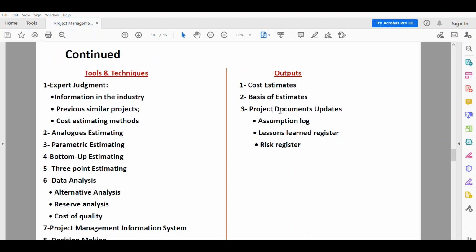Cost estimates can be presented in summary form or in detail, and costs are estimated for all resources that apply to the cost estimate. This includes, but is not limited to, direct labor, materials, equipment, services, facilities, information technology, and special categories such as cost of financing, including interest charges, inflation allowance, exchange rates, or a cost contingency reserve. Indirect costs, if they are included in the project estimate, can be included at the activity level or at higher levels.